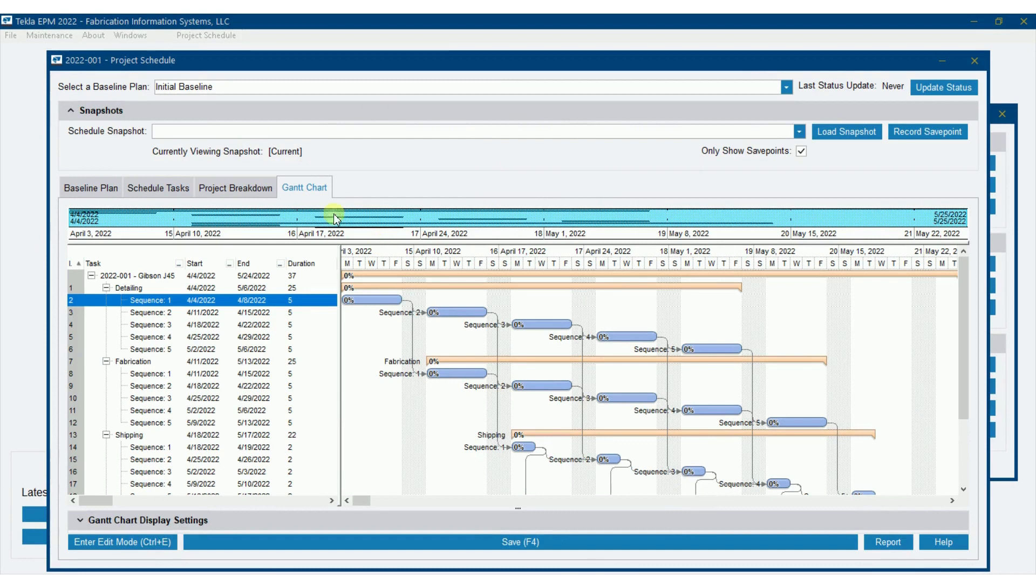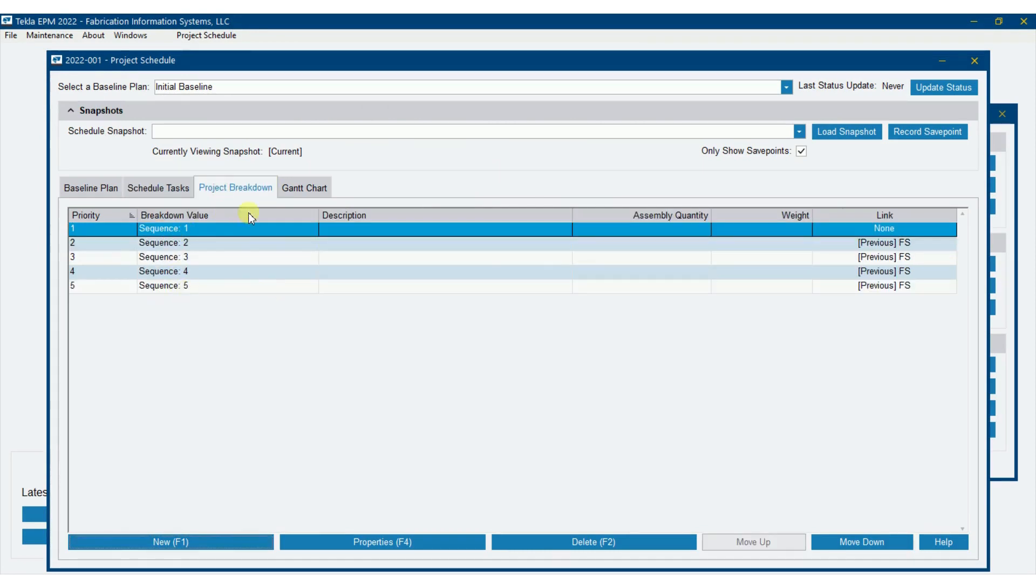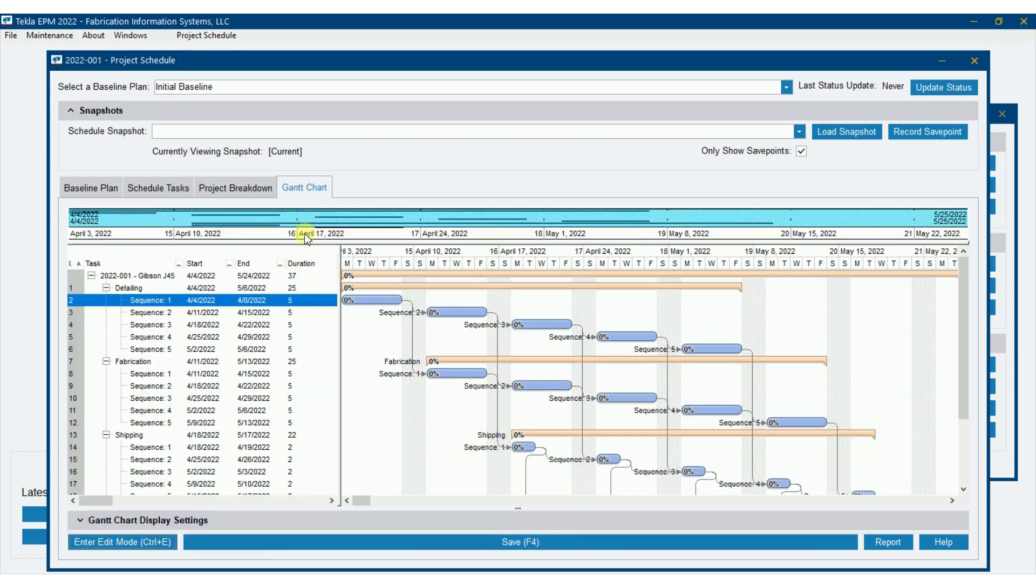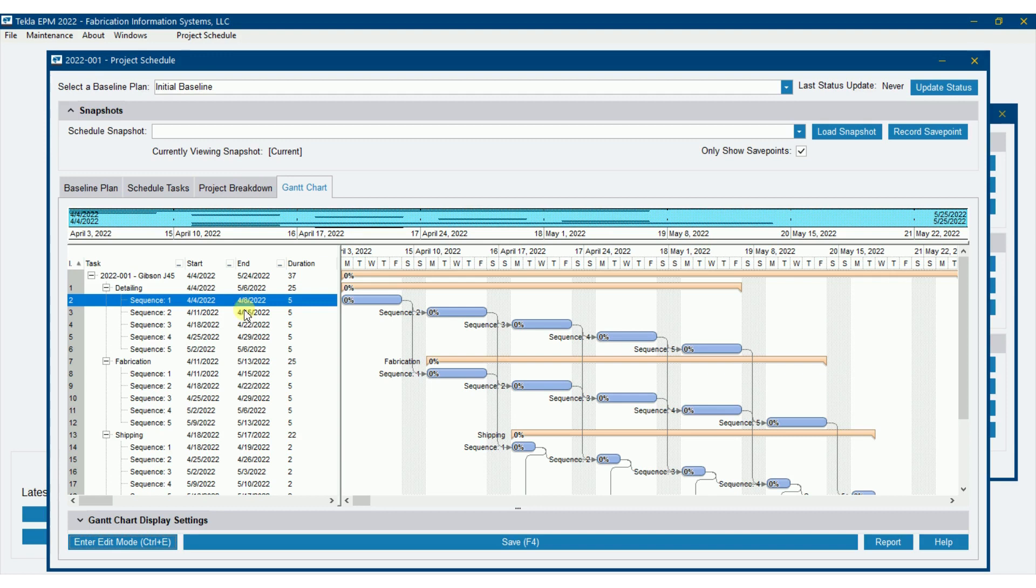So far, we have built scheduled tasks, detailed fabrication, shipping, and direction. We put in project breakdown of sequences and showed you how to put in lots as well. And then that built our Gantt chart. We came over here and put in start dates and end dates for all of the sequences along with all the tasks there. That has built the skeleton of our Gantt chart here.